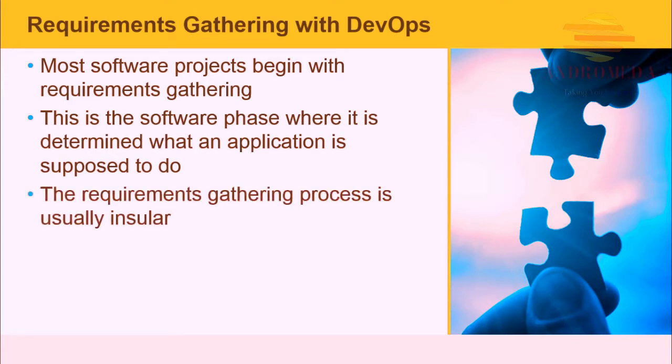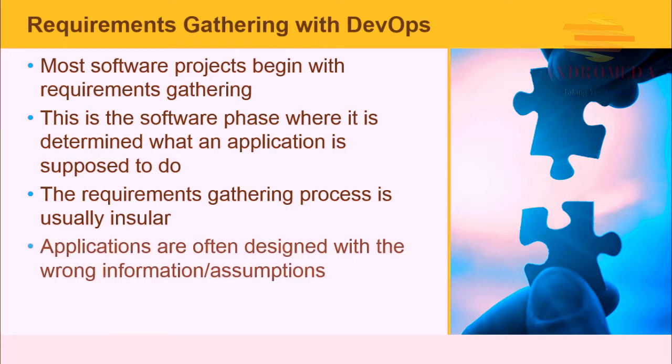The requirement gathering process is usually insular. This phase can be very political and may even be secretive. In most cases, little attention is given to existing production systems and lessons learned from their deployment. New applications are often designed with wrong information and assumptions.